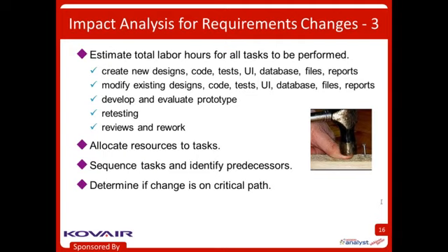And also, this is kind of important, think about whether that change would be on the project's critical path. By definition, if new work comes along or existing work is modified that is on the critical path, that affects the overall project schedule. So it's kind of nice to know that before you start saying, yeah, we could throw this all in, but sure, we'll still be done on time. And then you can estimate the cost and schedule impact from the effort.